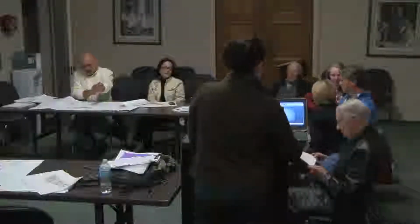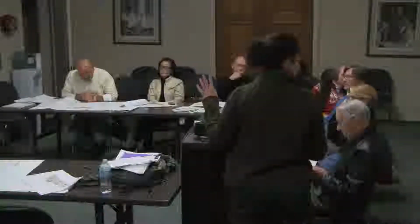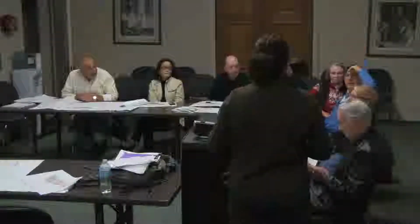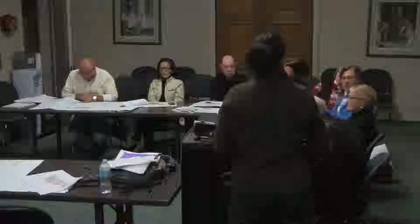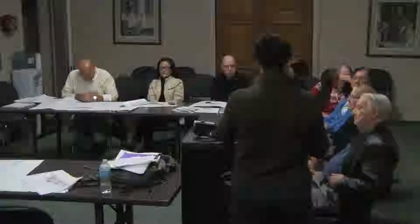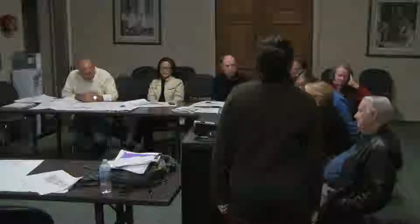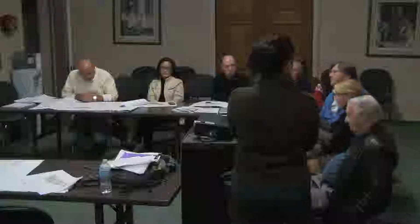This might be a good segue to run you through what we should and shouldn't present at the public workshop next week. I'm going to skip through these front slides pretty quickly. Do you believe you have consensus from the group? I feel like I do. What I would recommend is, the town center task force did a cost study. It's public record, and staff can give it to you. It had a per square foot estimate that the council didn't blanch at, and I think it was of that magnitude, but I could be wrong. I'll look at the year it was done and talk to my cost estimator about probable escalation.